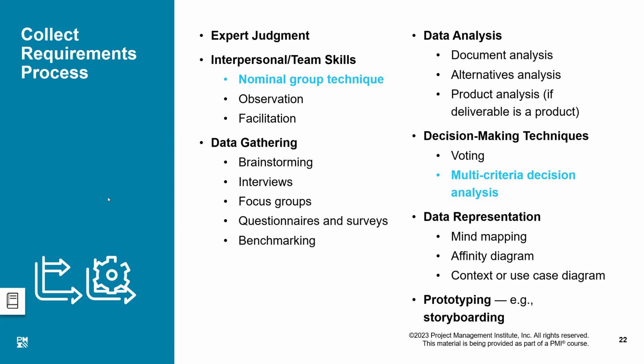Now there is a difference between the final requirements and the scope of the product. Only those requirements which have been finalized, which have been agreed that they have to be included in the project, will be developed as the product, as the product scope. Because product scope is dependent on the finalized requirements.